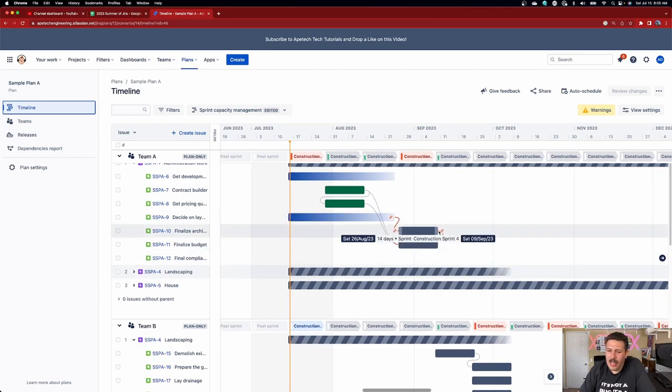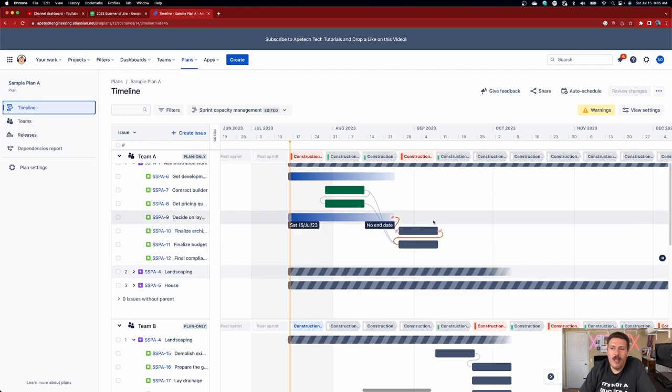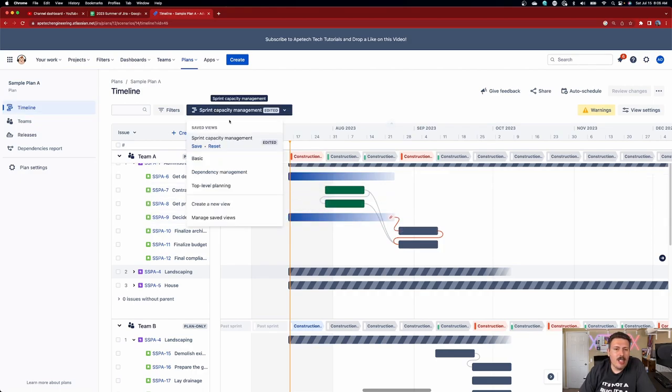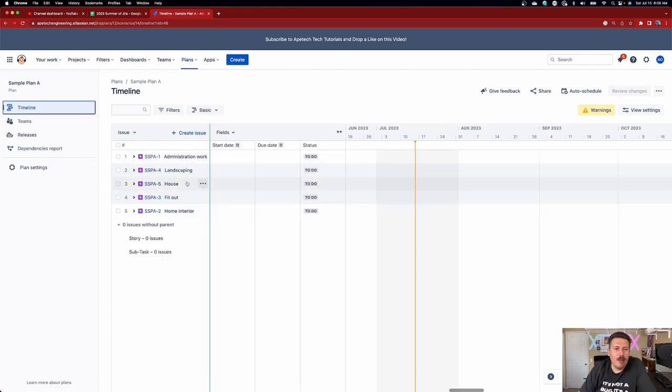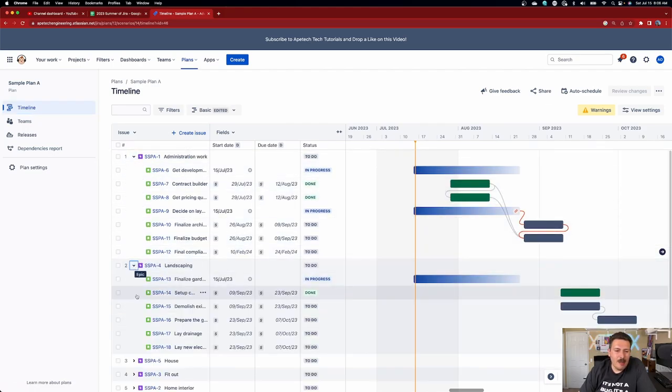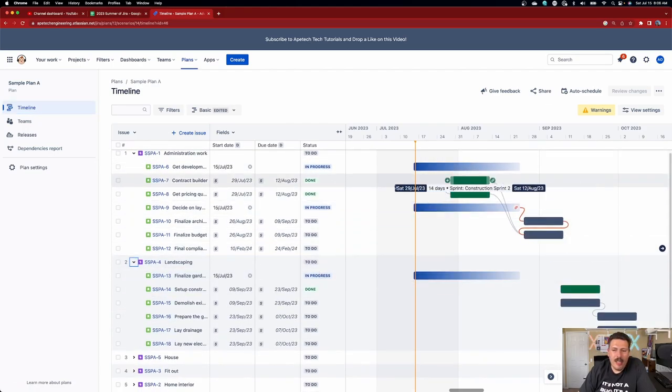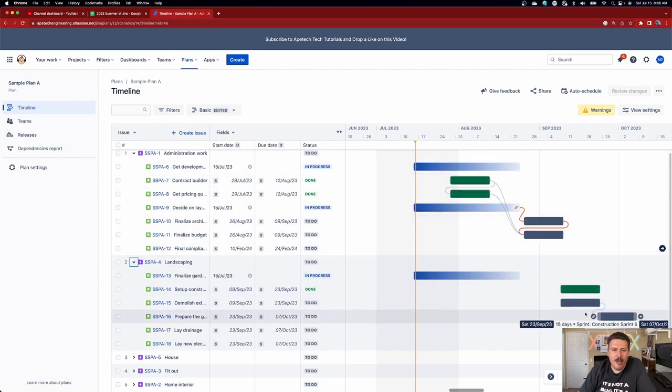Well, as you can see, we can kind of zoom in here a little bit and you can see how all these dependencies are basically tied to each other. You can see the dates that they're adding. So this one's adding a 14 day block and you can pan around and just see all the negative and positive effects of these dependencies. So this one's clearly a 14 day block. You're not, not good at all, but yeah, that's, that's kind of interesting. That last thing gives us just a way to kind of visualize what this is supposed to look like. Anytime you see red, that's no bueno. Red dependencies basically mean that you're, you're going to be late. You're going to be bad. It's, it's not going to help you. And, and yeah, so let's actually change the view though. I kind of want to come over to basic cause that's the view that I'm usually used to. I usually just look at top down. So as you can see a little bit simpler view and you can just see all the different dates that they've put.